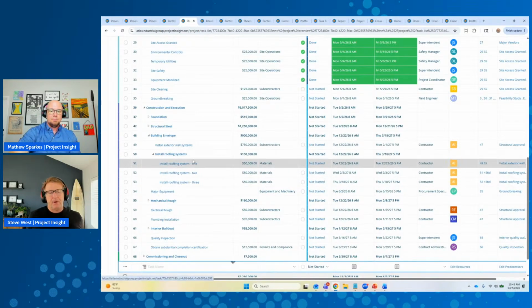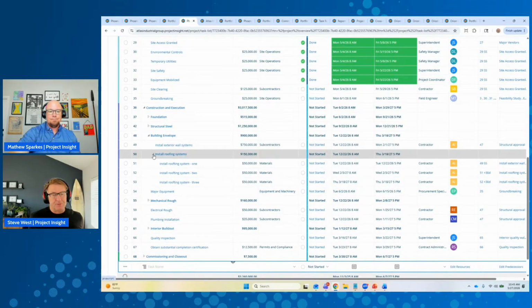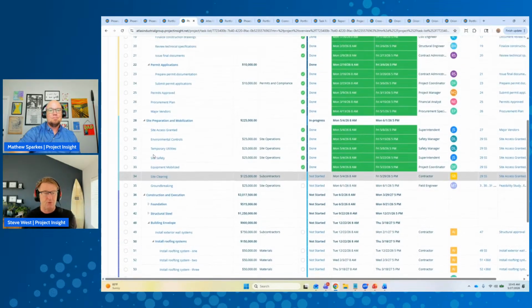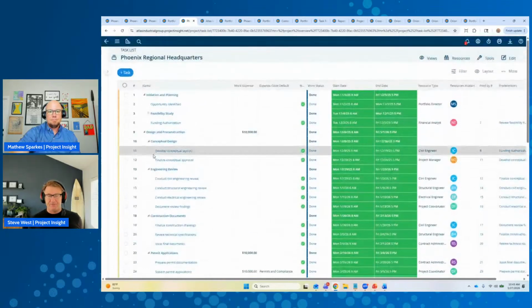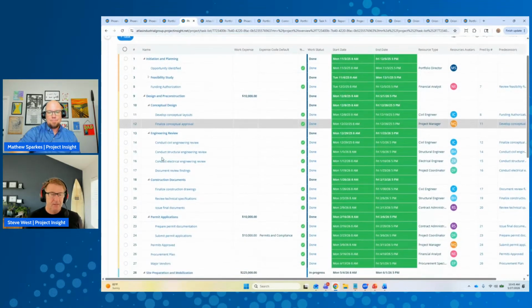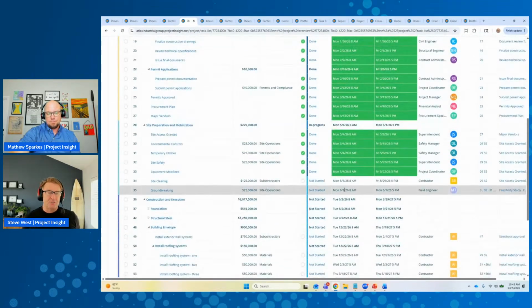Right, and then the reporting shows what happens is the Project Insight will actually automatically amortize these costs over the date range that you've chosen for your plan. So let's say the whole project shifts out into the future. Yep. Then those costs will auto shift. So you don't have to go back to your spreadsheet and update 50 cells. It'll just do it for you. Thanks, Steve. I don't want to update 50 cells.